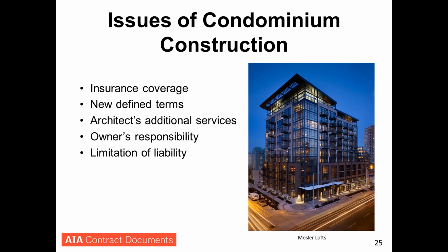And the protections in your owner-architect agreement don't protect you from that direction. You don't have a contract with those eventual homeowners, and so anything that gets written into your owner-architect agreement doesn't really help you when that lawsuit comes along. And so we backed up and said, well, how can we help the industry in this marketplace? Figure out how to manage these risks, and a guide that identified the kinds of things that will protect against the eventual claims are the best protections against those lawsuits.